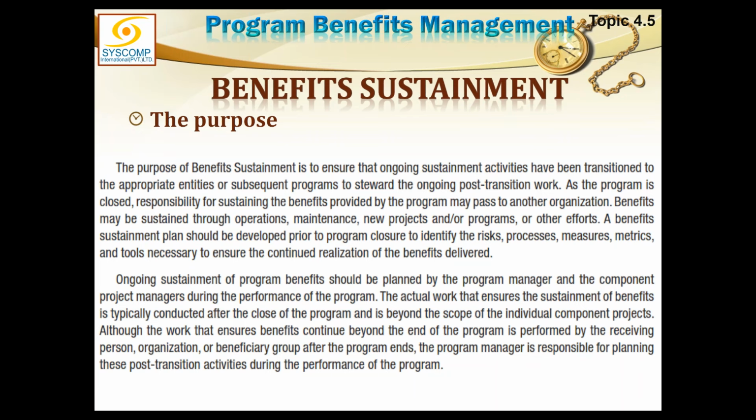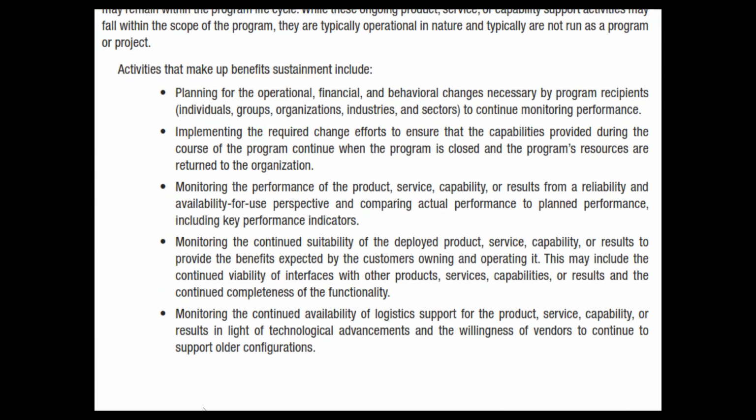So it's typically conducted after the close of the program and is beyond the scope of individual component projects. So it is not done by project, it is not done by program anymore. Although the work that ensures benefits continue beyond the end of the program is performed by the receiving person, organization, or beneficiary group after the program has ended. The program manager is responsible for planning these post-transition activities during the performance of the program.